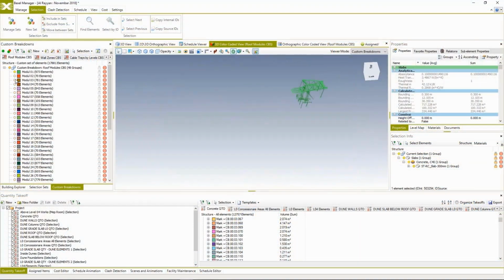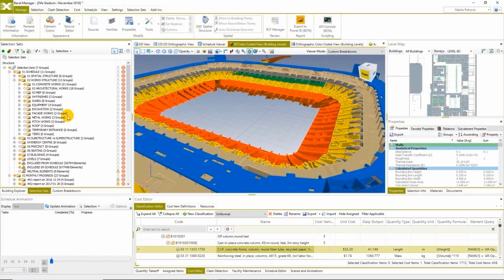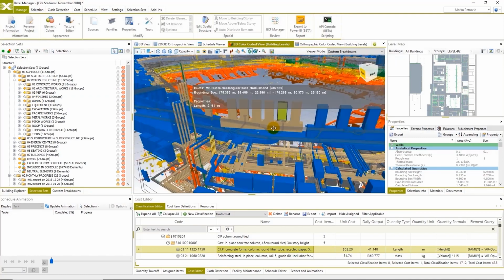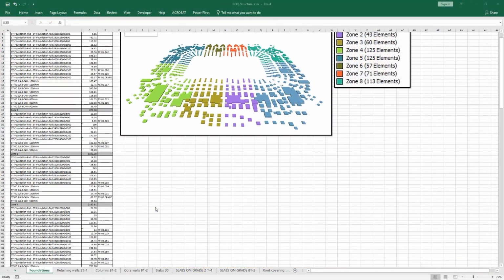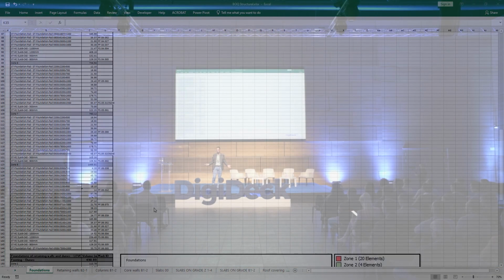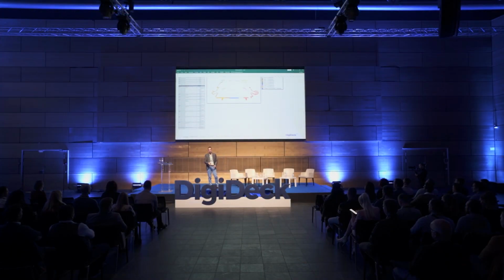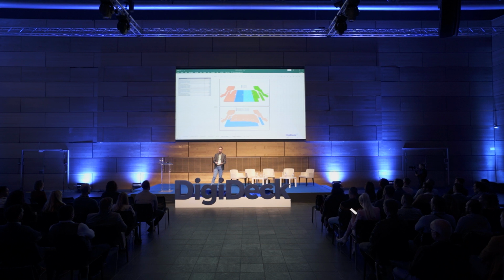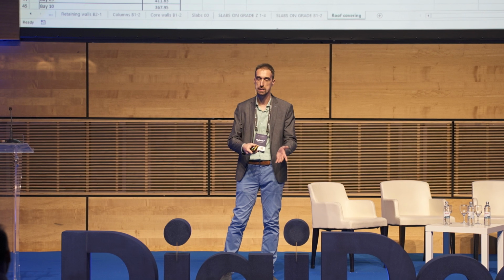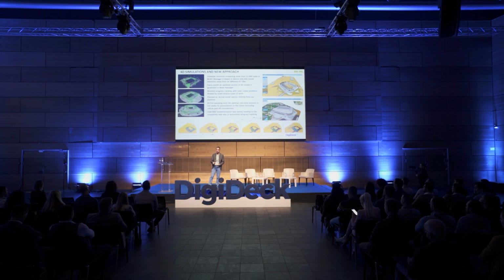was also involved, where they used available information from the BIM files, from these extracted quantities, and on top of that, they verified all information, and if needed, they corrected some information. It's also always a normal thing that something does not exist in the BIM files in 3D, so they needed to anticipate and calculate some, let's say, cost items which don't exist in the BIM model in order to have accurate cost estimation. For the scheduling purposes, we also try to implement and use advanced scheduling tools.